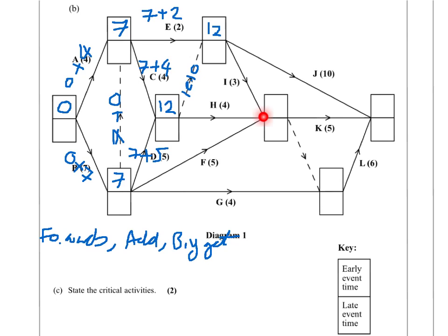Notice I'm going forwards the whole time, I'm adding, and I'm taking the biggest. So now I've come to this box here. It's either seven plus two, or it's twelve plus the dummy activity, which has a weight of zero. Seven plus two is nine. Twelve plus zero is twelve.